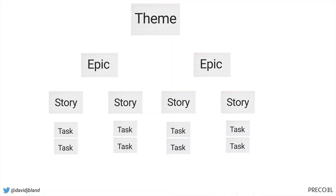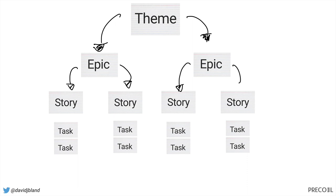Most companies use something like this where they define their high-level themes for the year. Then they break those themes down into epics, and those epics get broken down into stories because the epics are big chunks of work. Then those stories are broken down into smaller tasks that are usually day-to-day stuff. The reason behind this work breakdown structure is to keep your day-to-day stuff aligned to your stories, aligned to your epics, aligned to the big themes you're working on.